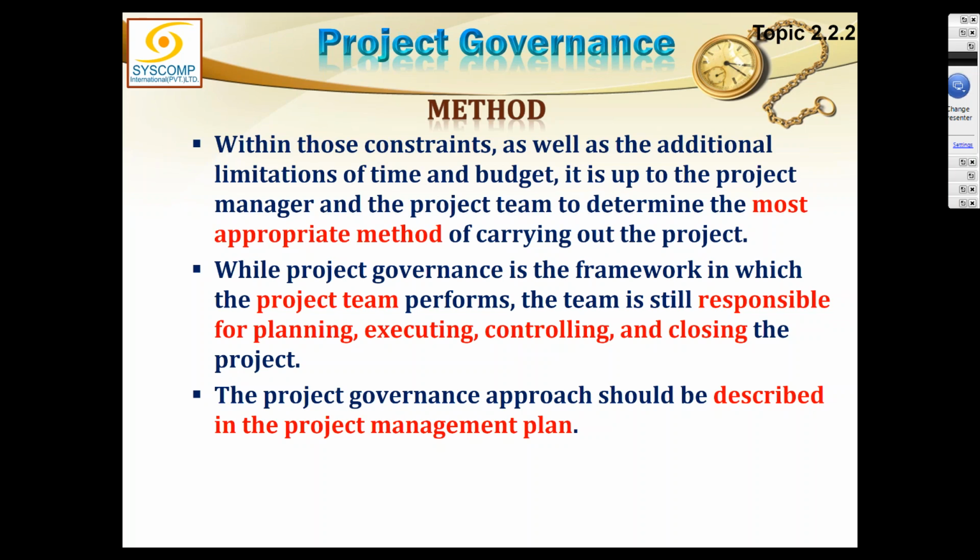So this is also management by exception. They are not interfering with your job, but they are only coming when they are required to be, checking your work. And moreover, in case you have a problem, the escalation path is also part of the governance mechanism, and therefore you can always get in touch with your sponsor or people from whom you seek the decisions. So this is a decision-making framework as well.